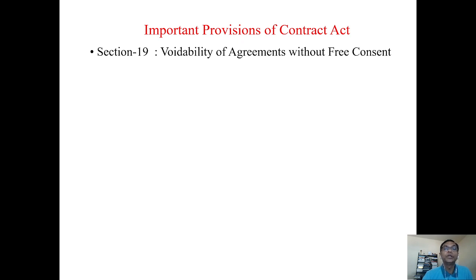Suppose tomorrow at a particular location at the site, the investigation report may go wrong. There may be some different strata. To surmount this, what they say is that it is only indicative. The bidders are required to do their own investigation. This is the reason, to avoid such eventualities of misrepresentation, such a condition is given in the contract.